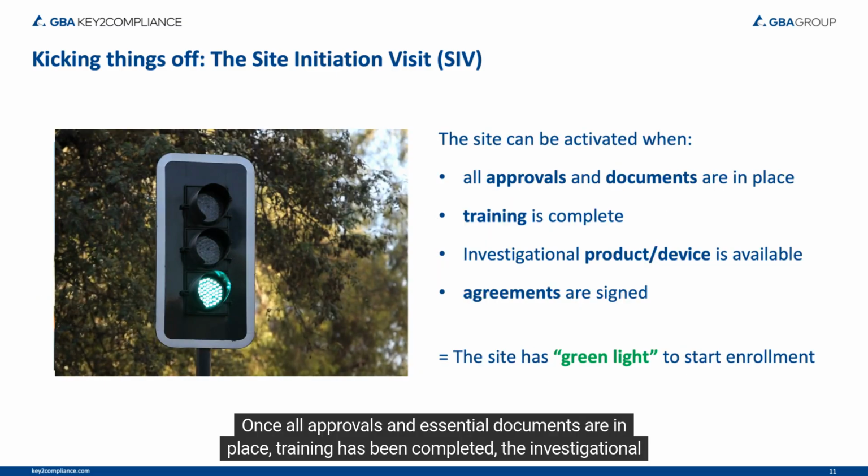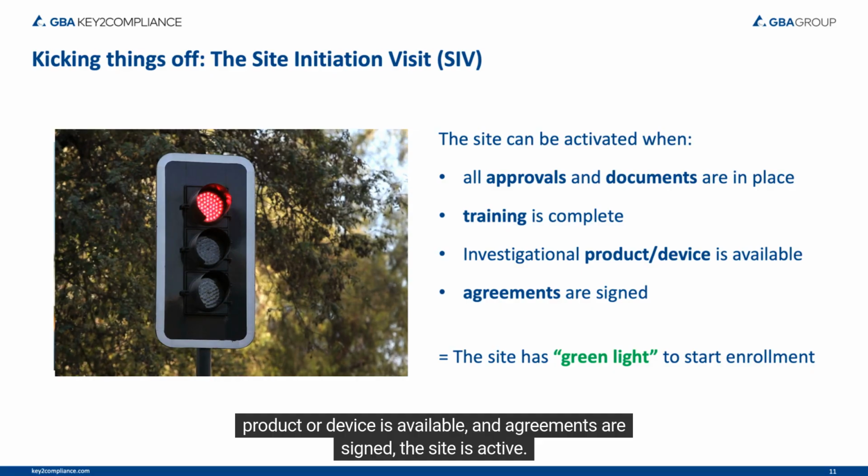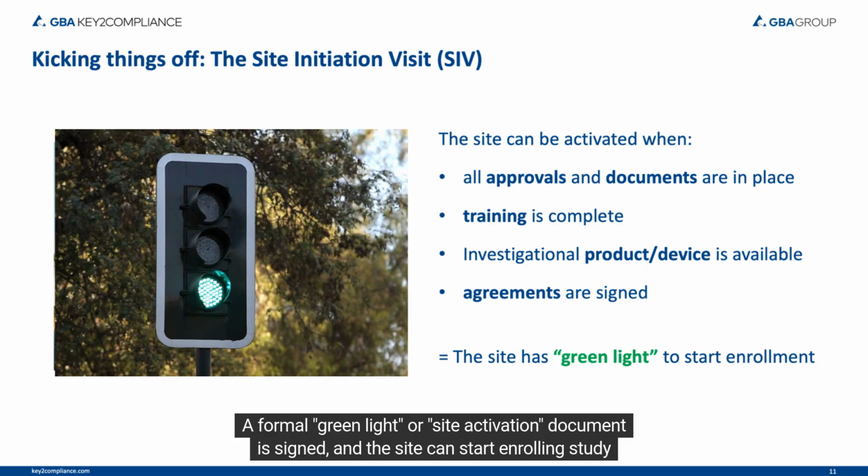Once all approvals and essential documents are in place, training has been completed, the investigational product or device is available, and agreements are signed, the site is active. A formal green light or site activation document is signed, and the site can start enrolling study participants.